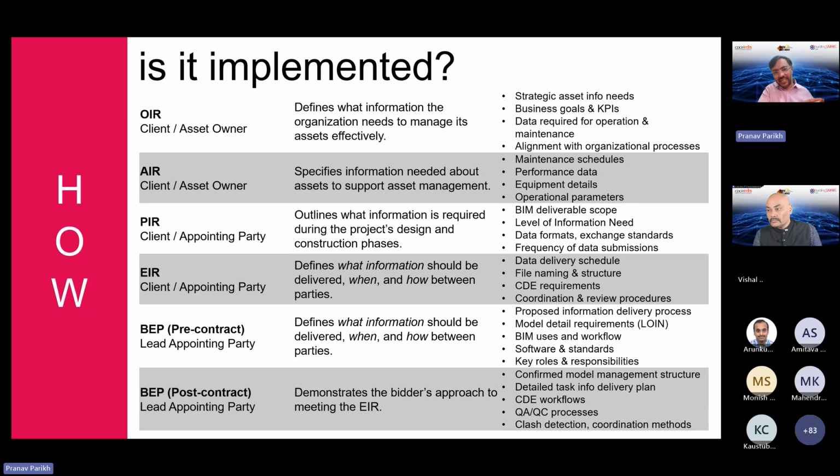Some clients can connect some data to EIR and BEP. They overlap a bit in terms of the requirements. EIR is usually created by appointing party, but the BEP is created by lead appointing party. So again, either your principal consultants or PMCs or BIM consultants will create your BEPs, and EIR is coming from client owner. But the most important part of the document, in our opinion, is the BEP.